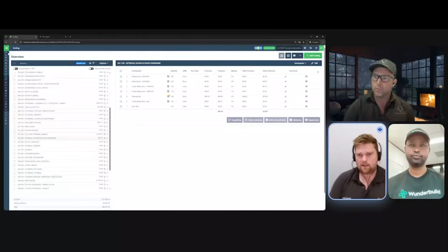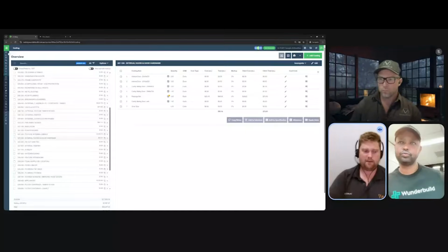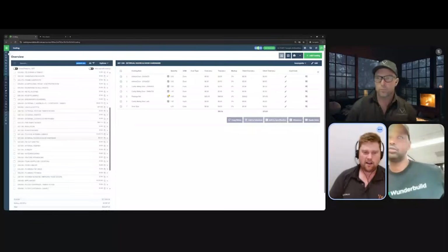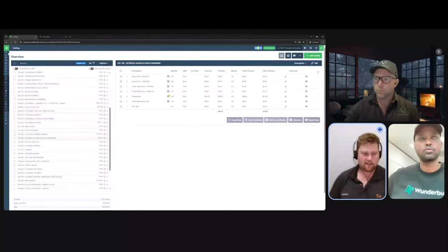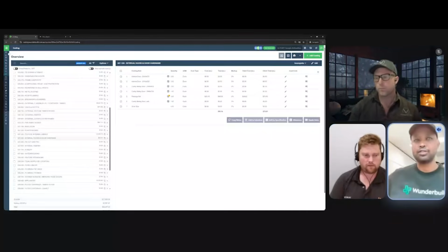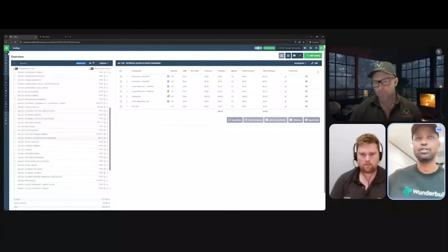That's right. And because it's linked, Hashi, correct me if I'm wrong, but I'm pretty sure because it's linked supplier SKU to master SKU, one of the benefits is suppliers will never update the SKU codes of their items. So when you get an updated price list, all you're doing is saving it over the top of the existing customer prices. And because those SKUs won't change, it'll remember that link. Is that right? Yeah, absolutely. So you can get the spreadsheet of the price list and upload it back again into your price book, and it will keep all the links, all the relationship between entities, and nothing is going to break.